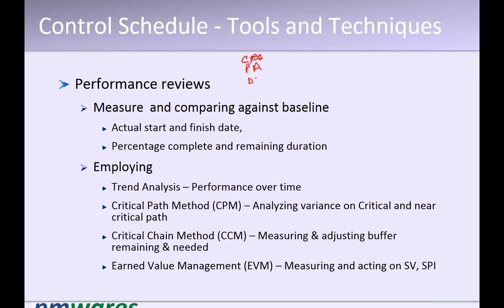Yes. So like here, let me explain this. Corrective actions, preventive actions, and defect repair. These are normally called change request in PMI terminology. Okay. Now, additional work in the project is also a CR, which we normally term in our normal projects. Okay. Now, when we are making it an integrated change control system, it is either of the CR, either these three things or additional in the scope. Anything will be there, they will be treated in the same way.